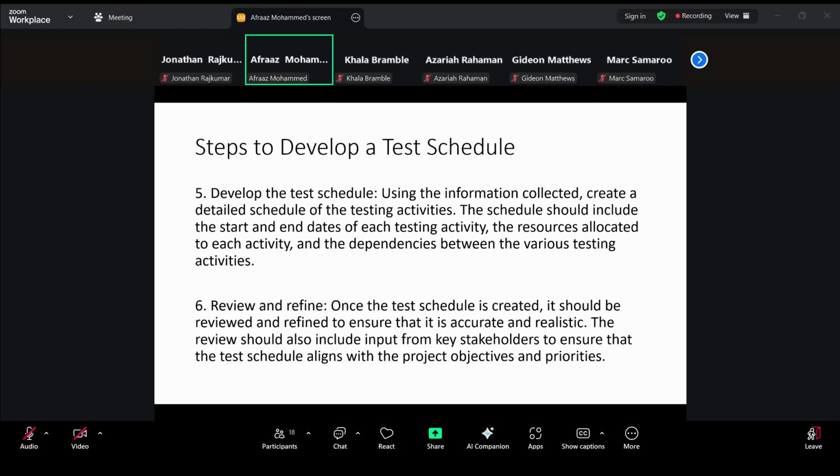And there's also priorities. So they might say, okay, you need 5 weeks, but these are the important things. You know, we want to check that we could log in. We want to check that payment information is happening. And that could be done in 2 weeks. Okay, we could test that in 2 weeks. And then the other stuff could be done afterwards. All right, so many times that happens. Many times a solution is accepted or handed over to stakeholders, even though some features and functionality isn't working 100%. Right, so be aware of that.